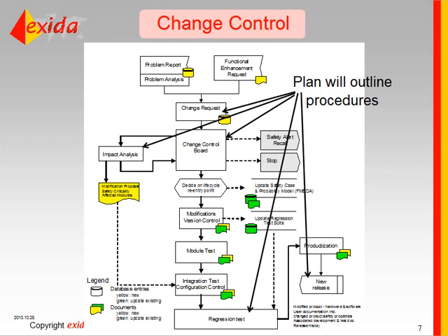And so this group reviews the change requests, decides which ones are worthwhile to consider, and for those that are worthwhile, an impact analysis must be done. That impact analysis essentially analyzes what is the impact on functional safety. If this product was developed to be compliant with 61508 and is supposed to be fail-safe and reliable, what is the impact of these changes? What could the changes affect?